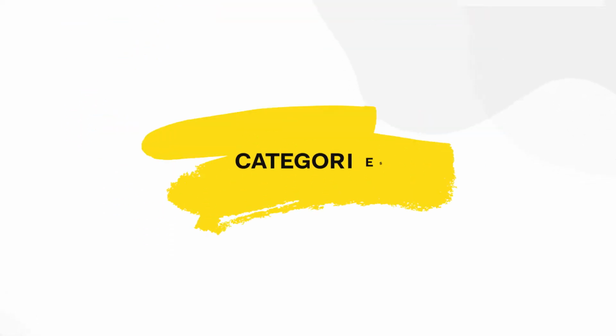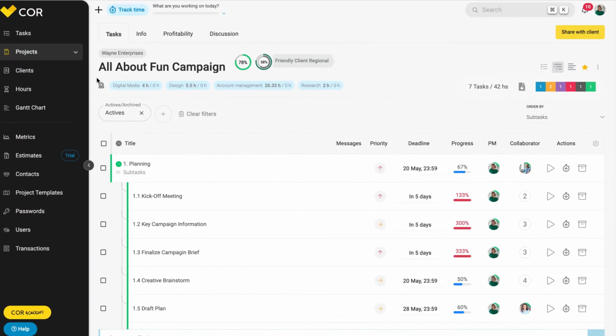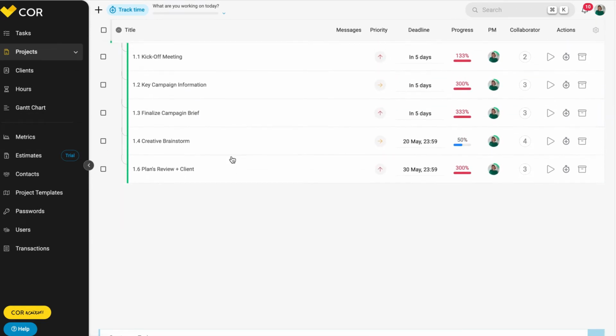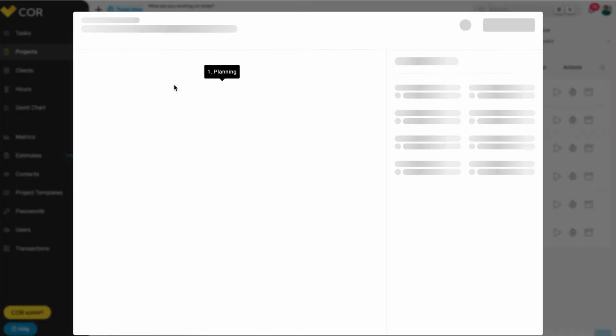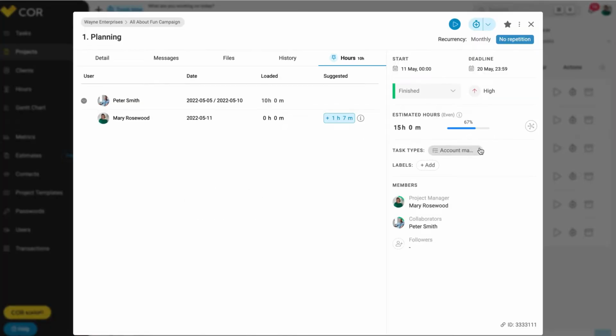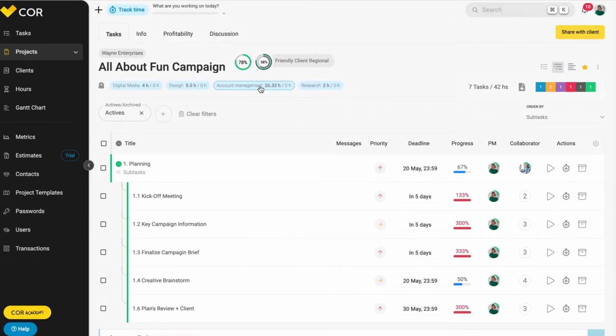Components. Categories. If you want to differentiate the tasks by associated categories, just click on the ones you want. The tasks must have their task type assigned in order to correspond to a category. If you want to remove the filters by category, click again on each one.